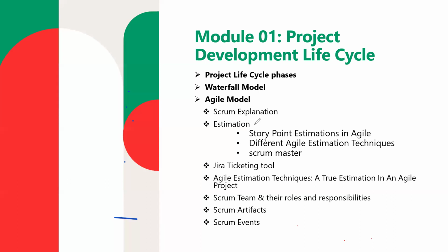At the same time, there are two developers having similar knowledge and similar experience, but for one story point, one developer will take 1 manday and another developer will take 2 mandays. Why? Since the first developer already has some knowledge in that particular area or story. Maybe in a previous sprint he worked on related tasks, so he has already done the study. But for the second developer, this is the first time working on this particular API or piece of code, so he might need more time to understand and then develop.